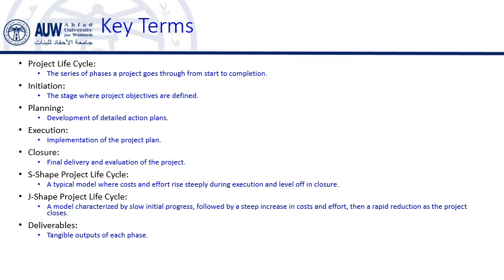The S-shaped project life cycle is characterized by a gradual build-up of resources, followed by a peak in the middle of the project and tapering off toward closure. This pattern is common in projects where the work is initially slow but accelerates as the project progresses, peaking during execution and then decreasing as the project nears completion.